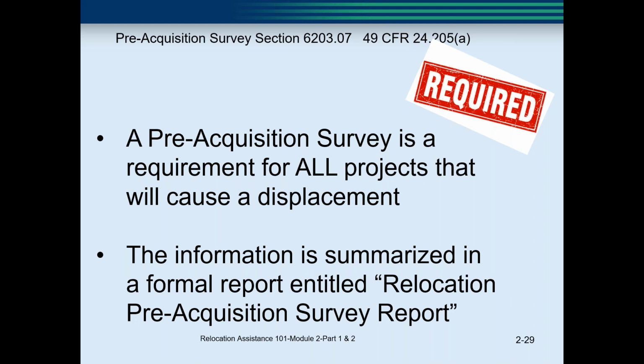However, unless you have a very large project with a lot of relocation, often the follow-up to actually prepare the pre-acquisition survey report is often forgotten. The relocation manual and CFR are very clear that the requirement for the follow-up report is for any project that has a displacement, not just the ones that have a large number of displacements on them. The statutes do not say it is only needed if you have more than 5 or more than 20. It does say all.